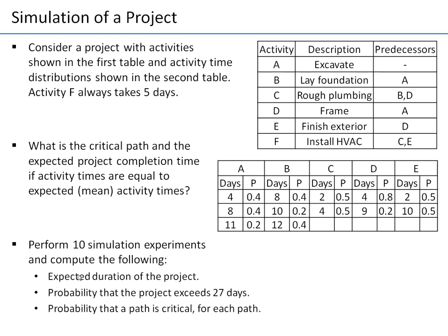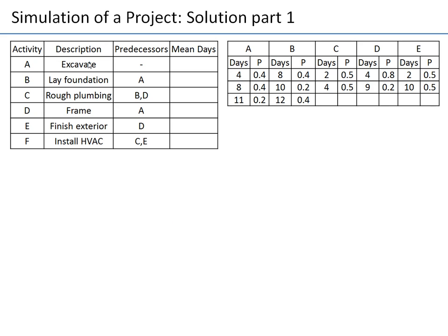The performance measures include expected duration, probability of exceeding 27 days, and probability that each path is critical. First, we use the Critical Path Method for expected or mean durations. For activity A, we compute the expected value: the expected time is calculated from its probability distribution.